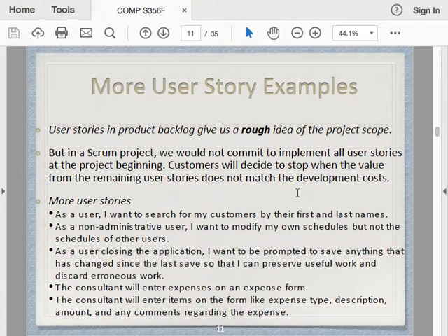When do we conclude a Scrum project? That is a trick question. I guess immediately some of you may think, oh, by the time I finish all the PBIs, all the user stories on the product backlog, then our project's finished, right? Wrong, okay? That's a trick question. In fact, the customer would be getting new features every month or two, okay? And then the user stories on the product backlog would be implemented one by one.